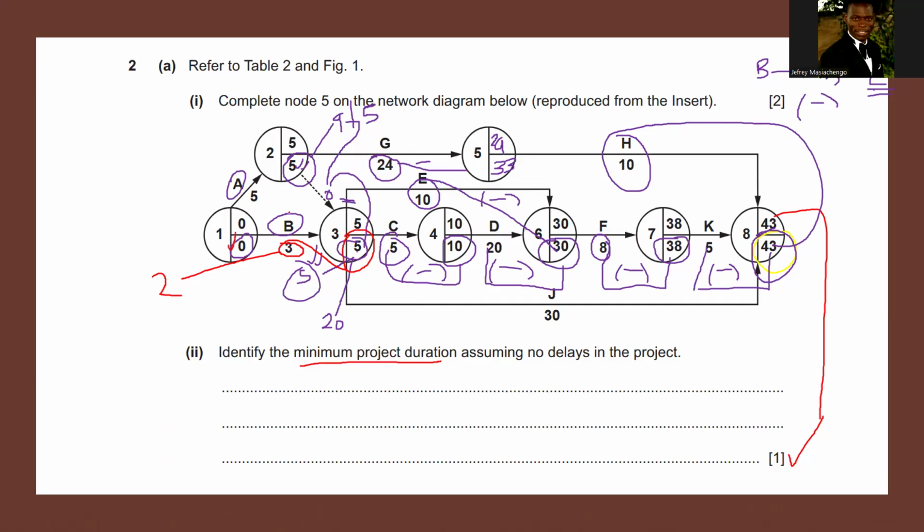They are checking these two events are converging. So they are comparing this 5 minus 5. What do you get? We get a 0. So what is the rule for a backward pass? Always take the lowest. Then this is our 0. I've done a backward pass. That's a world-class teaching that I'm providing here. So I hope it will assist you in examination.